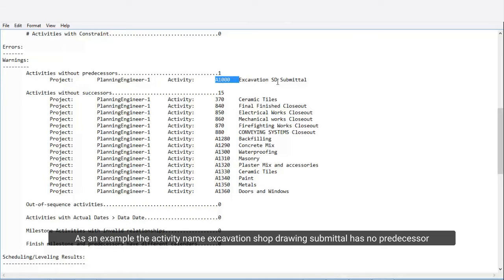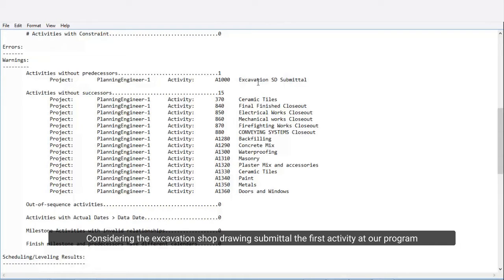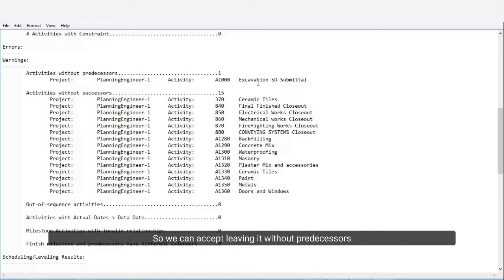As an example, the activity named Excavation Shop Drawing Submittal has no predecessor. Considering the Excavation Shop Drawing Submittal is the first activity in our program, we can accept leaving it without predecessors.